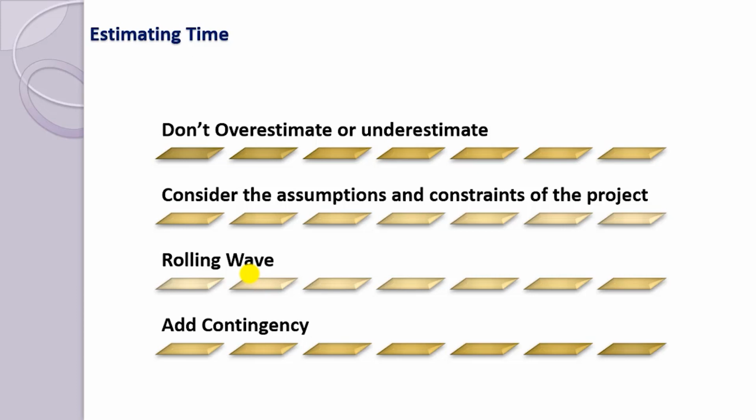For any deliverable that's too far out to estimate, you can use a very broad-based estimate, and only put the effort into breaking down the detail and estimating properly the work that comes in the immediate future. So I usually suggest this rolling wave approach for projects, especially nowadays when the dynamics are very high.